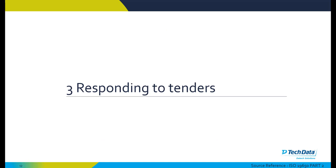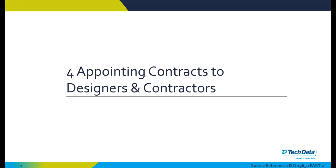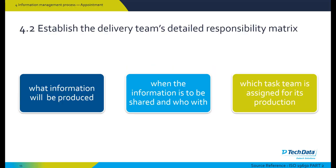At the responding to tender stage, we evaluate each task team capability and resource capacity, their capability and capacity to manage their particular responsibility of information, their capability and capacity to produce that information, and then their availability of IT and infrastructure within that particular task team. Do they have the particular skills? Do they need BIM 360 skills or BIM 360 training? And then appointing contracts to designers and contractors.